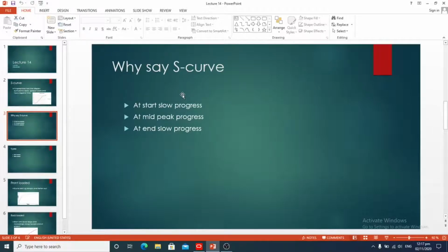After passing the point of inflection, the growth forms the upper part of the S curve. This part is referred to as the maturity part. The maturity is due to the fact that most of the project has been completed at this point and is in the process of winding down. Generally, when the project reaches this point, only tasks such as finishing touches and final approval remain.